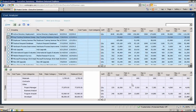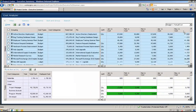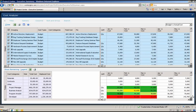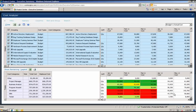We can also compare cost types to each other — for example, budget versus forecast. Let's compare the project budget cost type versus the actuals cost type. Now you can see a heat map of all overexpended periods by cost category and by project. Notice that we were overspending on both our developers and DBAs, so we may need to consider making changes in those areas.